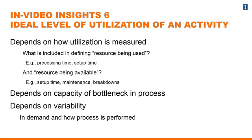Similarly, when you think about the denominator of this, you should be thinking about resource being available. Are we including any breaks in the time for when we are using the activity or the process? Are we planning for an eight-hour day or are we already subtracting the breaks? Are we making adjustments for setup time when talking about the resource being available? What's a good capacity utilization number depends on what you have in the numerator — the time you're planning to use the resource — and the denominator — the time it's going to be available.